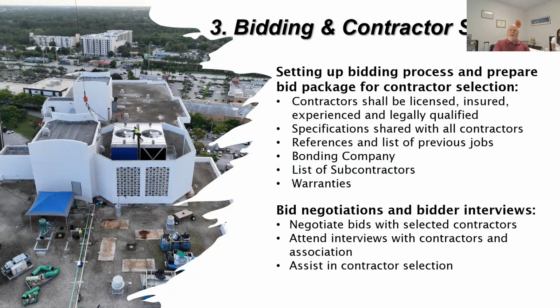This is also the stage where we're working with contractors. They will occasionally give us value engineering ideas. And on occasion, they are things that, even as deep as we have gone through the process, we don't think about. For example, I had one job where a particular contractor came up with a very creative way of staging, and we were actually able to be without cooling for only a very short period of time, based on the creative way they came up with to do the actual construction.